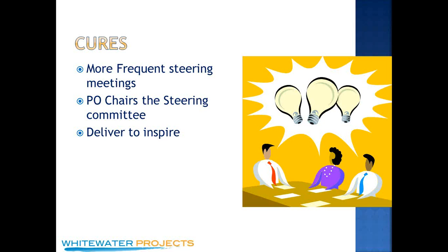You know, something to talk with your product teams about, too, on all these cases is, if we take on a little bit less in our iterations, if you're doing Scrum, if we take on a little bit less and make sure that we actually complete everything and don't have sprint carryover, yes, I've been in your sprint meetings. I know many of you have sprint carryover, right?